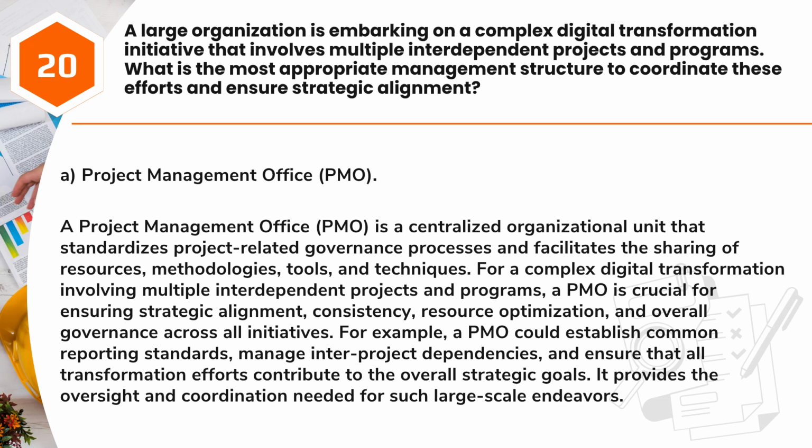For a complex digital transformation involving multiple interdependent projects and programs, a PMO is crucial for ensuring strategic alignment, consistency, resource optimization, and overall governance across all initiatives. For example, a PMO could establish common reporting standards, manage inter-project dependencies, and ensure that all transformation efforts contribute to the overall strategic goals. It provides the oversight and coordination needed for such large-scale endeavors.